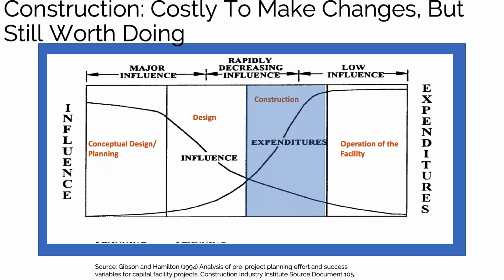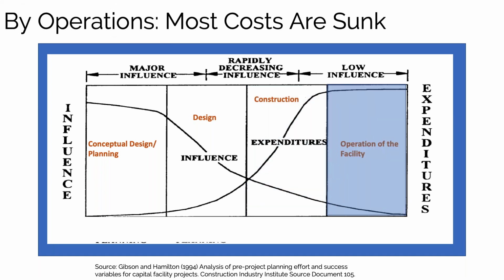So if something is put in one location and you really want it in another, that's going to be a major change. So it's going to cost us a lot of money. And then finally, the last part of the process is the operation of the facility. So that last blue box on the right. And by this point, most of the costs are sunk.